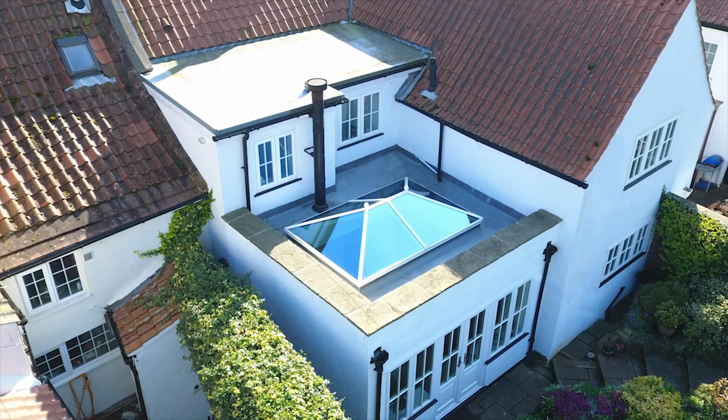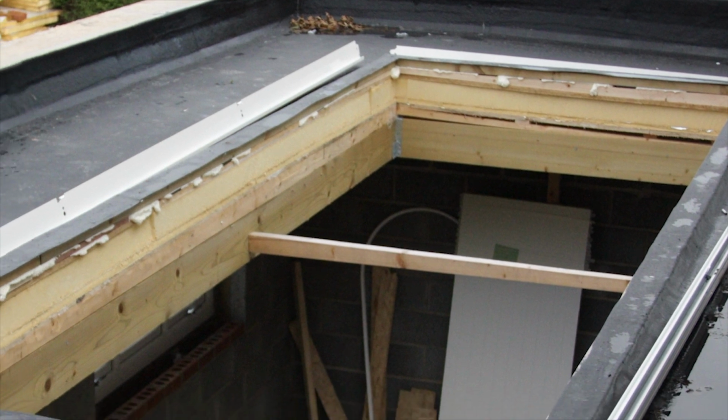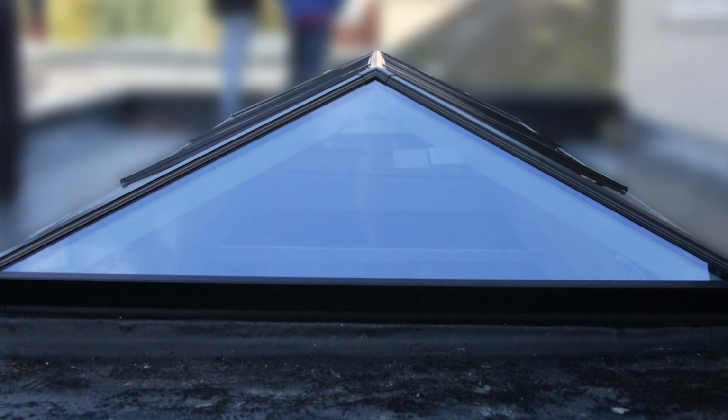Lead time's important. If you've got to rely on a 2 months lead time or something like that, and you build it and it's not the size you thought it was and you need to make a change, that's a lot of time waiting. And really, once it's built, you've got to have probably a plywood board screwed down over the top of it. It's not the ultimate waterproofing solution for your property. So being able to get one to site within a week, that's very important.